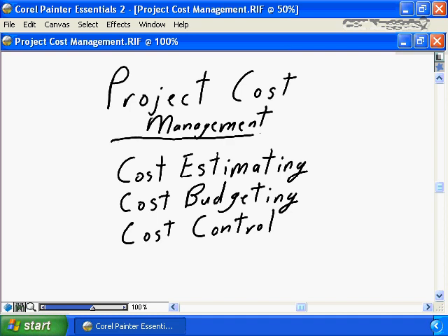This nugget is the first of two nuggets dealing with the PMBOK area for project cost management. This nugget, project budget definition, focuses on cost estimating, ensuring that detailed estimates are defined for each and every element of the work breakdown structure, ensuring that cost elements are defined to ensure that all the components, the human resource, the materials, and the other components required to complete each element of the work breakdown structure are defined and included